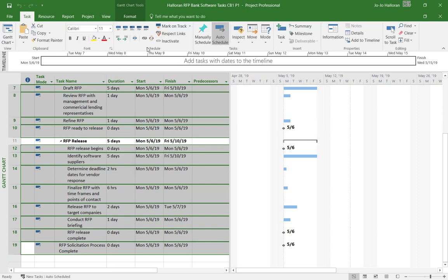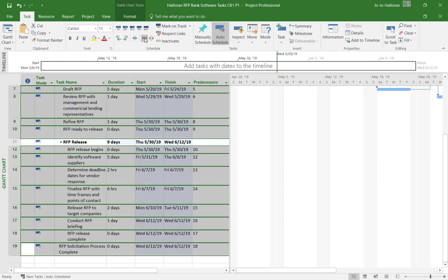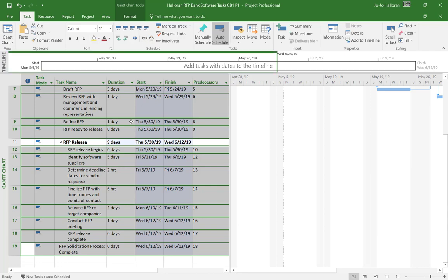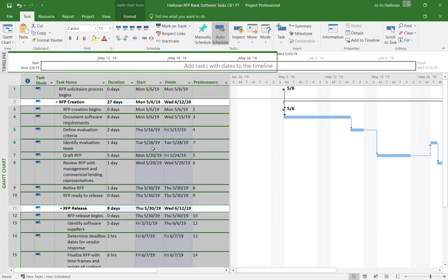And remember, we're going to come up here in the Schedule group and click on our little link icon. And you can always remember that the default is a finish to start relationship. So always remember that. If you have to change it, that's where you will go in and change your linking relationship. But it does default to finish to start.